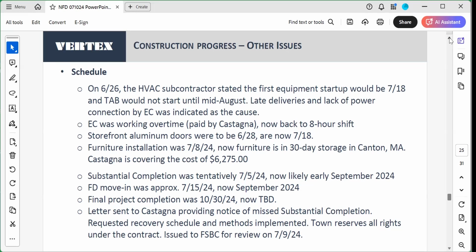But the reason Steve was running the meeting today and we were discussing all of this, I'm trying to get these dates in my mind, because at some point it may be to their advantage to put sod everywhere. The area out in front of the building that has the drainage structures and things like that in it, that's the area that has the different types of plants, but everything to the right and the left is essentially grass. And the question I would have, if they wanted to go this route, because that's established, right? Sod is established. So they could come out there, put the sod down, water the bejesus out of it. It's a technical term. For two weeks in the fall and have that really well established going into the spring.